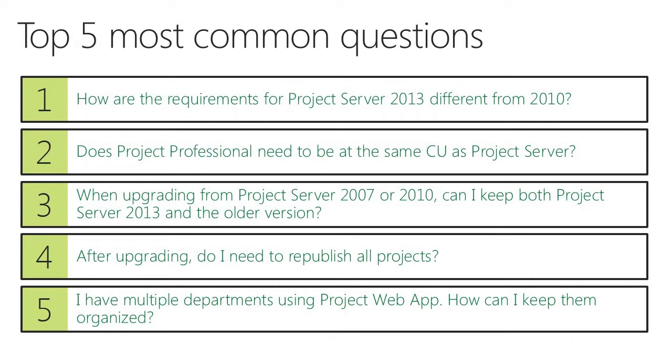I guess it depends on what you're really looking for, but the general answer would be no. Within the published database itself, you have all the same information that was there when you upgraded. So if a project showed that you had 3 tasks in the published database and there were 5 tasks in the draft database, you'll still show the 3 tasks in the published database.